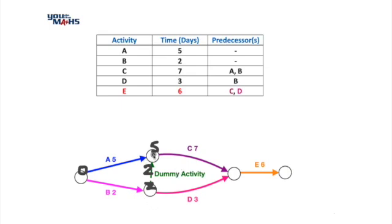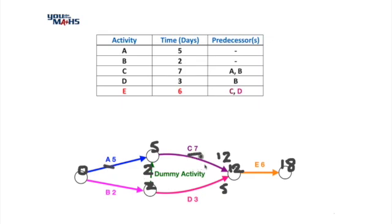Moving across the top, 5 plus 7 is 12 — that's the time to complete activity C. Across the bottom, 2 plus 3 is 5 for activity D. To start activity E we need both C and D completed, so we place 12 on that node, and 12 plus 6 is 18 days. The best time to complete this project is 18 days and the critical path runs through activities A, C, and E.